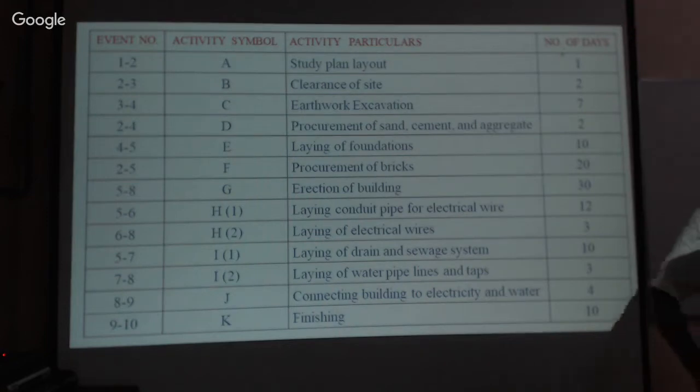Now mainly this is useful and employed by civil engineers, the project engineers. Therefore the time allotted, study plan: layout, 1 day; clearance of site, 2 days; earthwork excavation, 7 days; procurement of material, 2 days.